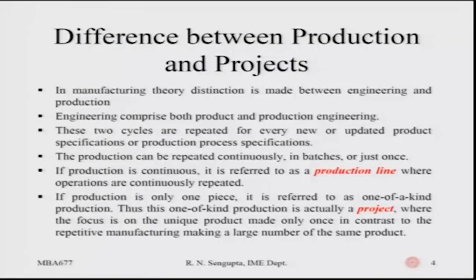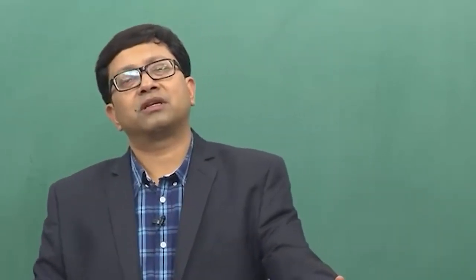If production is only one piece it is referred to as one-of-a-kind production — and that, done only once, is basically a project where the focus is on unique product design and unique production concepts used to implement it. This can also apply outside manufacturing — for example, a project for implementing a marketing strategy, coming up with a new drug that is one of its kind, or finding out the efficacy of a drug in the market and planning your strategy accordingly. Since it is only done one time, it is termed a project on a project management scale.